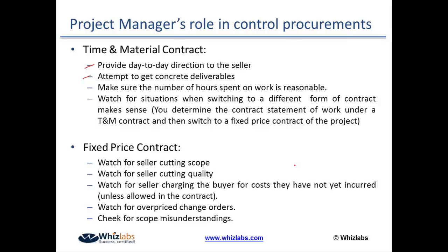I have a question from Skittage. Is there a threshold, like number of hours, etc., which helps the project manager decide whether to go for cost reimbursable or time and material? It goes this way. In cost reimbursable, at least you have to define the end product, isn't it, Skittage? If you cannot define the end product, then you cannot go for a cost reimbursable project. It's not that you have a criteria based on time or material. It's rather that it depends whether the final product is known to you or not.